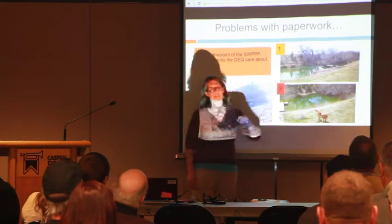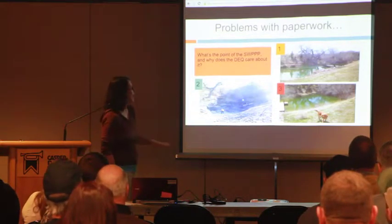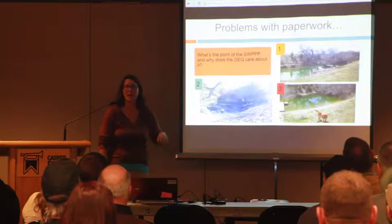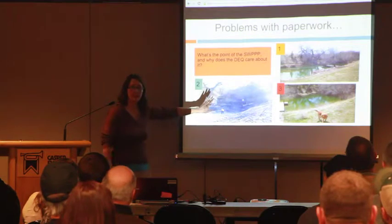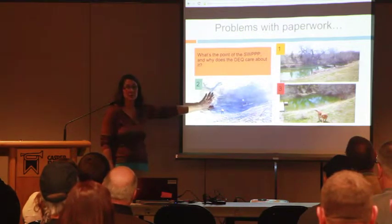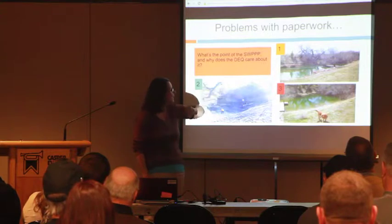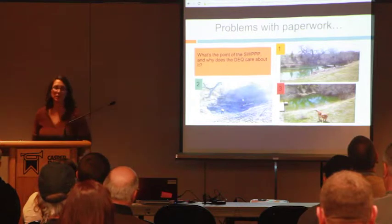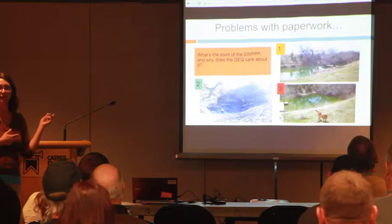So in photo 1, this guy had a really nice little fishing pond that he had stocked and things were great. And a construction site moved in next door to him. They did not put any BMPs in place. All of the sediment from their site washed into his little fishing pond. They spent, I don't know how many thousands of dollars, because they had to go fix his fishing pond. So they had to dig it out. They had to take all of the sediment back out of it, and they had to restore it to what it was before. It would have been a whole lot cheaper to put in BMPs, to have a plan, to know what they were doing, than it was to fix what they broke.